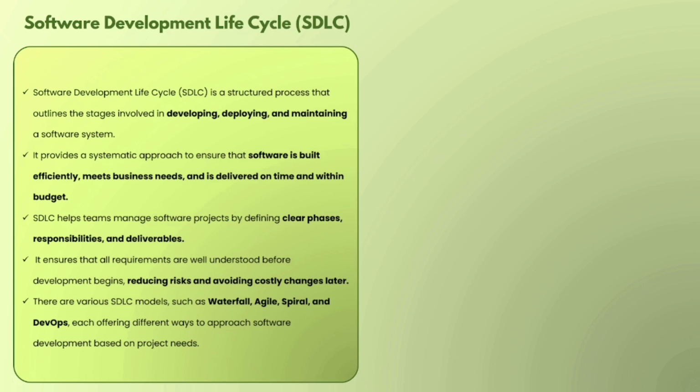Now the next point is related to us, meaning it is related to the business analyst. In SDLC, it ensures that all requirements are well understood before development begins, which reduces risk and avoids costly changes later. We'll see a quick example here. The BA documents that loan payments can only be made via bank transfer, but the actual need of the stakeholder or bank representative is that it should be deducted by bank transfer, by debit, and by credit card as well.